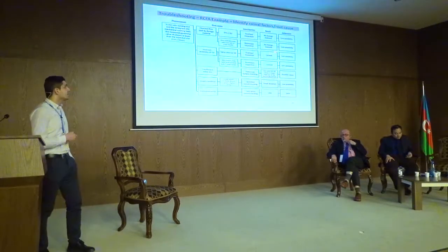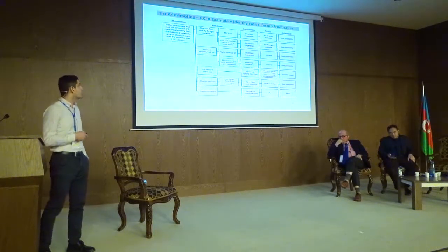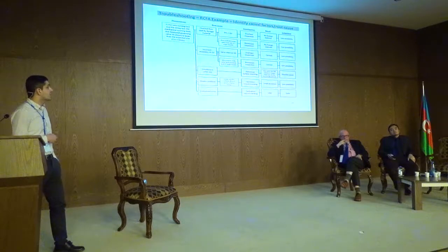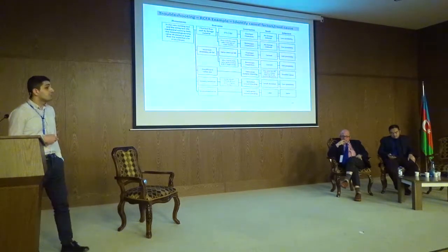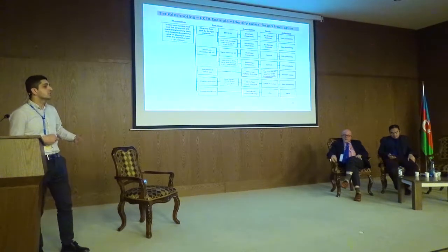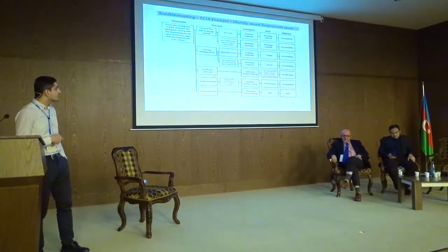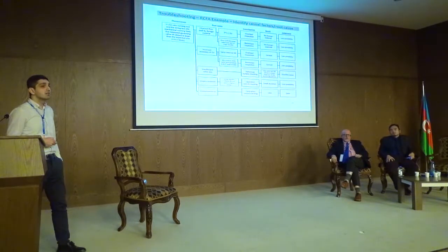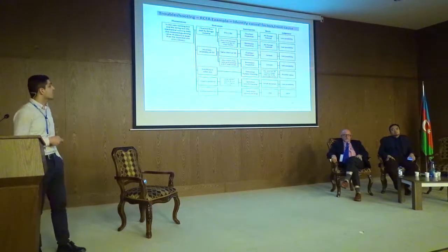In order to investigate this causal factor, we opened the turbine trip and throttle valve and the governor valves, and made an overhaul inspection and a borescope inspection, and we found that there was no foreign material there. Everything was okay, meaning that this causal factor was not likely to be the root cause. After eliminating some other causal factors, we came to the conclusion that insufficient valve size was the issue. The valve was not chosen properly in the very beginning during the design stage, so this is a design shortcoming. Compared to similar steam turbines with the same power in other plants, the valve size was much smaller than it had to be. The valve size was 22 millimeters, whereas the valve size in the steam turbines in other plants was 28 millimeters.